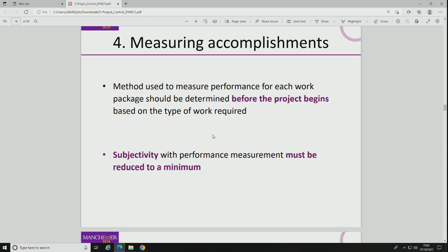And then by the time we get to this later part, we're going to say, okay, now we've got to 70%. And then at the very end, you say, okay, now we've got to 100%. So sometimes in those situations, you're able to have an upfront agreement on saying only when we get to this point can we say we've done so much percentage. Because it doesn't make sense to say 33%, 24%, and so on. It's just infeasible to say something to that precision.